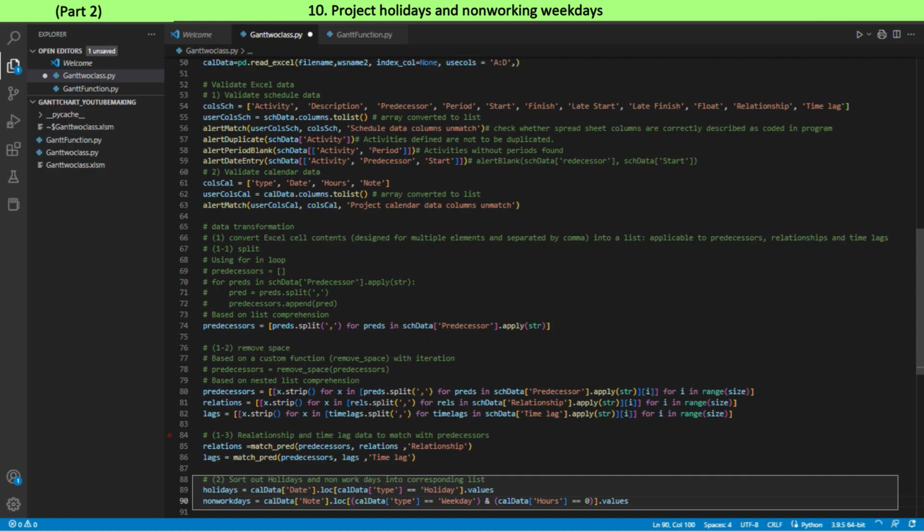Period is added to activity start date when activity end date is to be calculated. The holidays and non-work weekdays are not included in the amount of period when we calculate activity end date. Start date should not be one of holidays or not be one of non-work weekdays. Activity period is the number of working days only. Activity end date is based on the number of working days with holidays and non-work weekdays not counted as activity period.